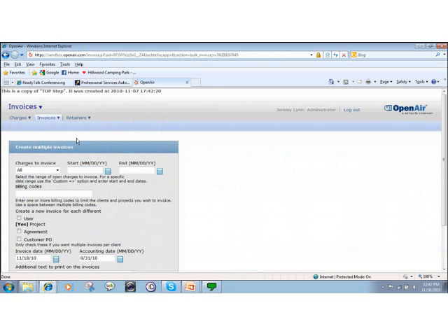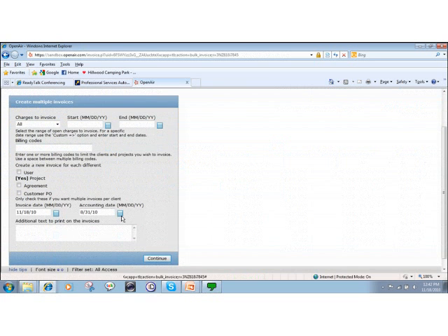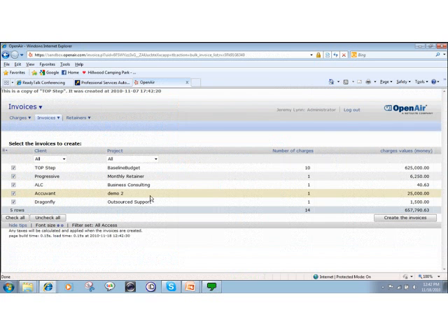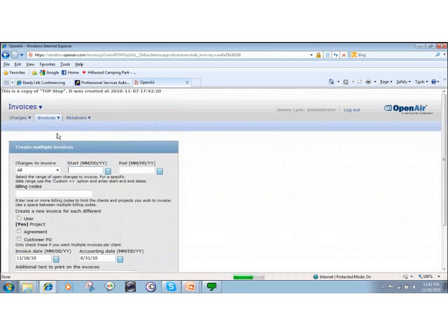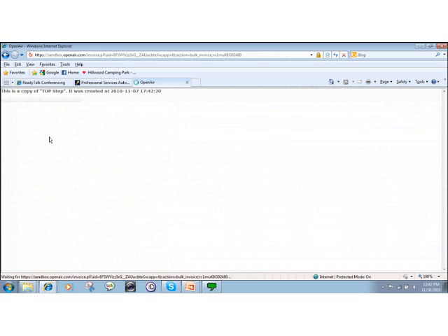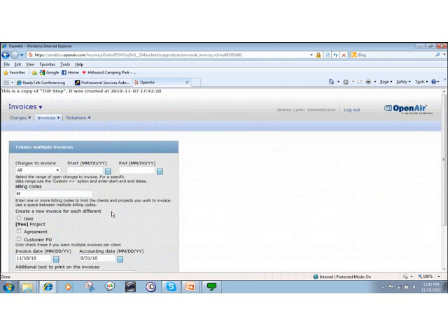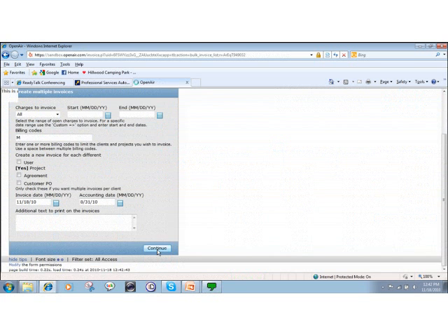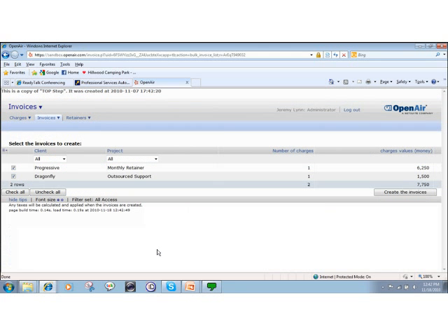If I create new monthly multiple invoices, you've seen this form, but you probably have just skipped over this billing codes field quite often. Okay? And when I run this, you'll see it actually wants to generate 5 different invoices because I just happen to have stuff sitting out there. But what if I redo this, except I only want to format or create invoices for my monthly projects? So again, I'll use that monthly billing code, and you guessed it, the only projects that should be coming up to get invoices are my 2 monthly projects. So it's a nice way to sort of create a filter without having to do too much customization in the system.